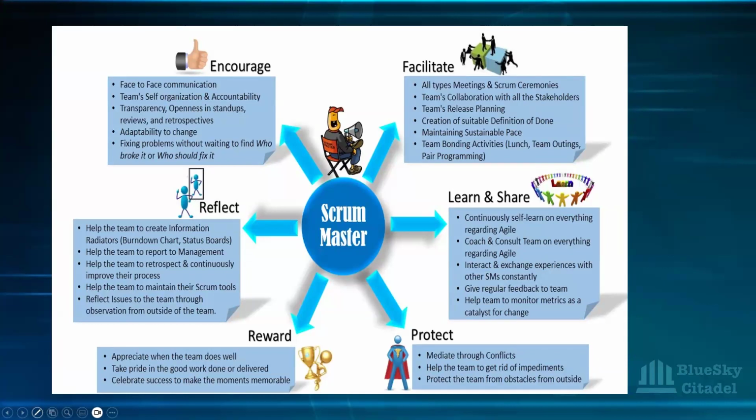There are times when at the end of the sprint, you as a Scrum Master will provide what we call the sprint report of how that sprint has gone, the goal. Were we able to achieve the goal? We didn't achieve the goal. Why didn't we achieve the goal? What are the things that happened during the sprint? Is it because of the capacity? Anything could have been the reason. You need to be able to report that sprint to management.